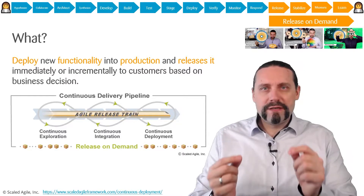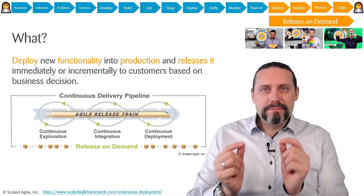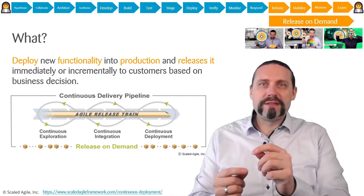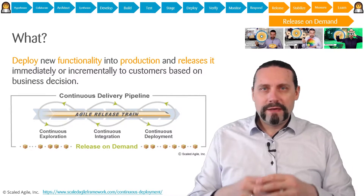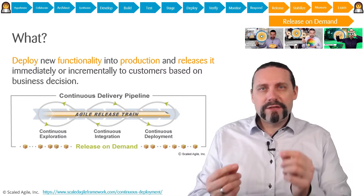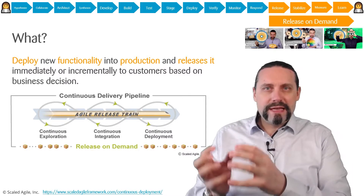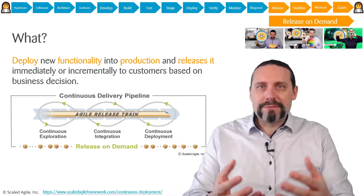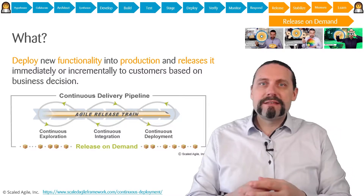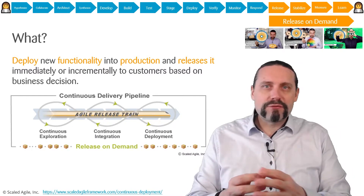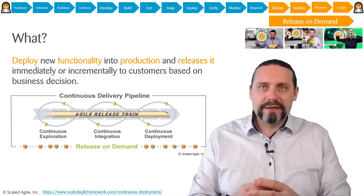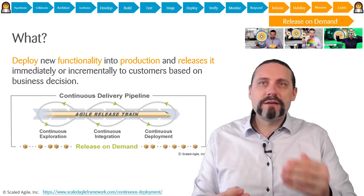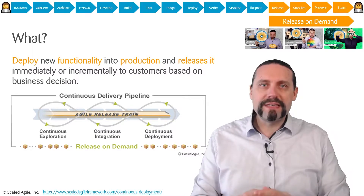After that, we architect the minimal amount of architecture needed to prove this hypothesis. Then in Synthesize we break down the epic into features, which we can bring onto a backlog, prioritize those features, and also create a roadmap and a vision. This concludes continuous exploration and we move into continuous integration.